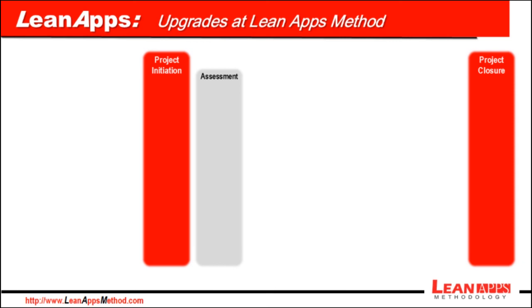We cannot forget this is an upgrade project. New enhancements could be implemented in future releases or projects. In this phase, we also define what customizations will be laid off and what updates are required for custom objects that will be migrated. For that, we could also use the 3 core reports shown in the previous slides to map the changes between releases.